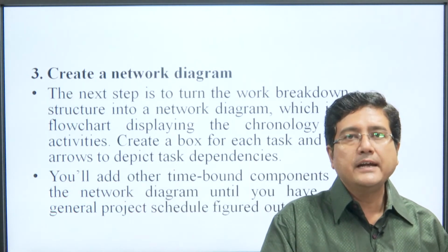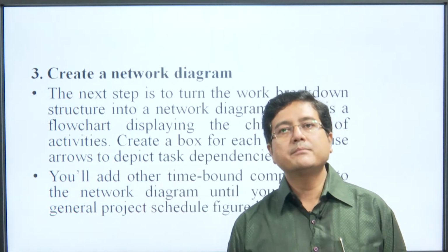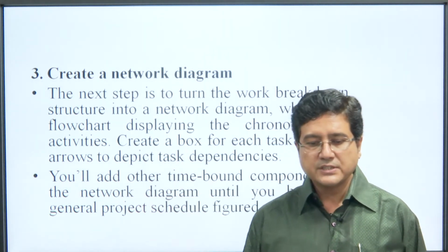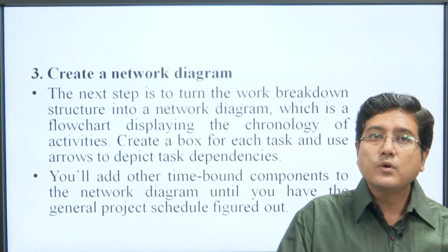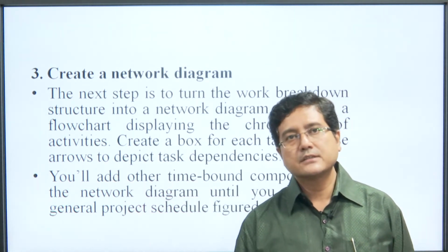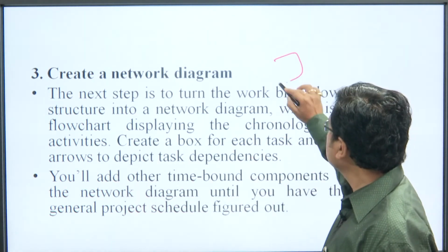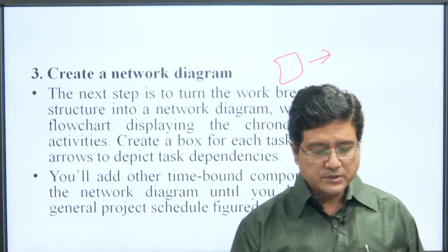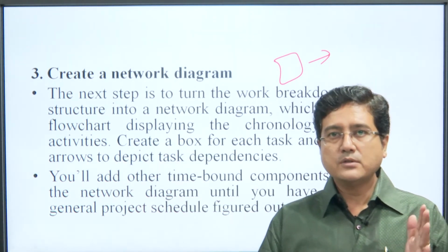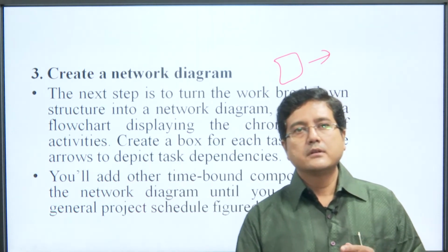Third step, create a network diagram. The next step is to turn the work breakdown structure, as I did, into a network diagram, which is a flow displaying the chronological order of activities, creating a box for each task and using arrows for dependency and independency.